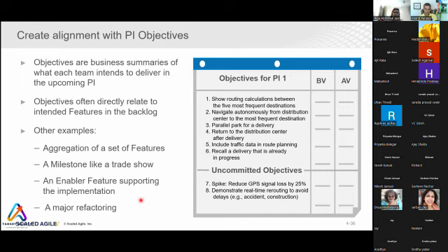See, if things can be completed in 3-4 days, accommodate them in the IP iteration and finish it off. But if this work has uncovered a lot of other work and new scenarios, and you need at least 1 or 2 iterations to complete it, then say upfront that you're not able to deliver this feature, and it will spill over to the next PI.